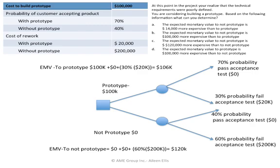The expected monetary value to not prototype would be $0 to not build the prototype, $0 if the real product passes — therefore no rework — and 60% times $200,000 to rework the real product out in the field.